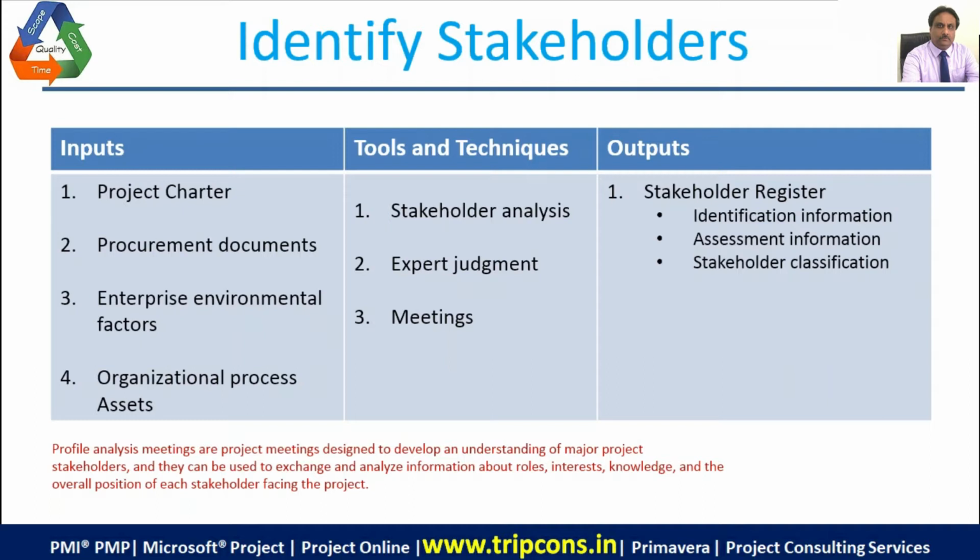The charter also has the names of the client side people, those who are initially signing the purchase order or the work order, so that you can contact these people and start identifying further stakeholders and build up a stakeholder list from the client side. The tools and techniques would be stakeholder analysis, expert judgment, and meetings. What do we have these meetings for? In this meeting we analyze the profile.